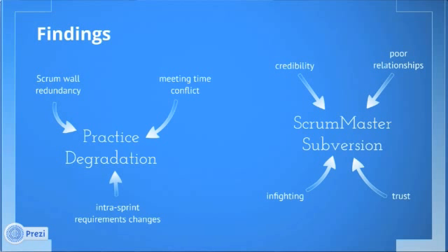The Scrum wall. So in distributed Scrum, you end up with two Scrum walls. In regular Scrum, you have literally a physical wall with a bunch of sticky notes or index cards attached to it that indicate what everybody's doing. And the point of that is that anybody can walk by, see the physical wall, and have an instant sense of what everybody in the team is doing, where everything is, what the status of things are, and who's working on what. But in distributed Scrum, not everybody's in the same office, so that doesn't work. So you end up having to have a virtual Scrum wall. And usually you end up with both.